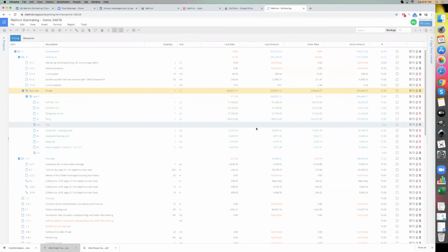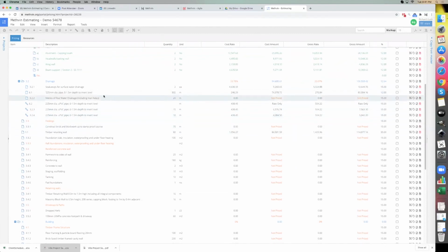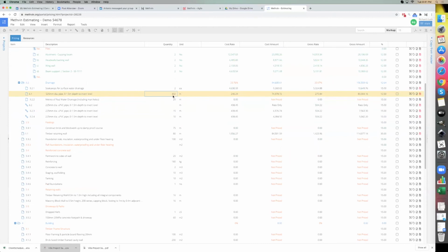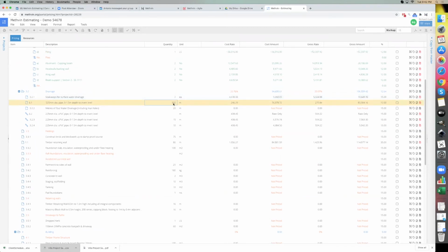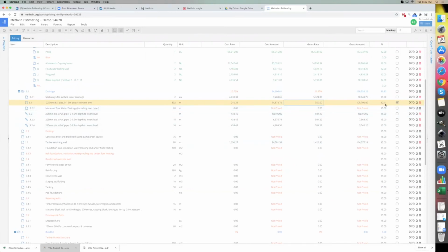Okay. So let's say you're reviewing this job and whilst you've been working on it, you did a takeoff of these 225 storm orders, and you suddenly realized that the client made a substantial mistake and he only measured 300, or he left a column out and there was actually, sorry, a zero out, and there's actually 3,000 linear meters of this. You may want to say, okay, let's try improve our return on this line item and say we're going to make 25%. And you'll see as soon as you change it, you could even change the selling rate, let's say, to 350, and it'll reverse engineer it and tell you you're going to make 42%.